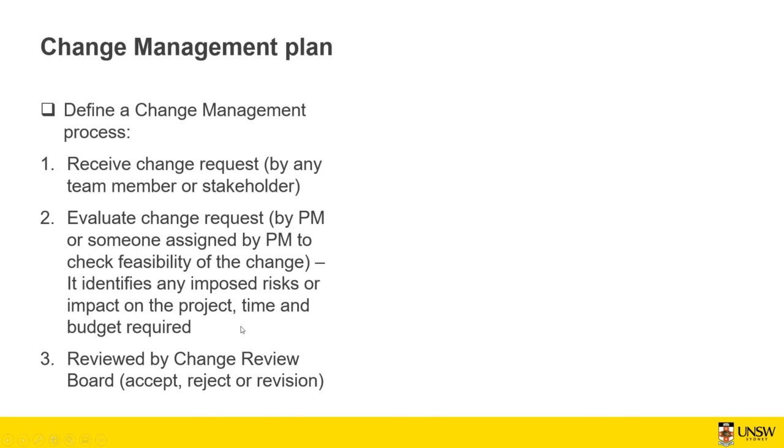Then the change request and the assessments by that person are going to be submitted to the change review board, which can be a combination of some key stakeholders, the project owner, or the project manager, etc. And then they can accept, reject, or revise the change request.